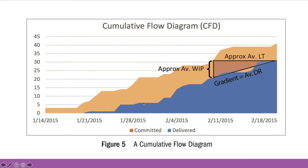Continuously monitoring the approximate values for the average work in progress and the average lead time leads us to the ratio of the average delivery rate. This leads to a possible and desired outcome that represents a continuous growth of the orange area and a continuous throughput throughout the project's lifetime.